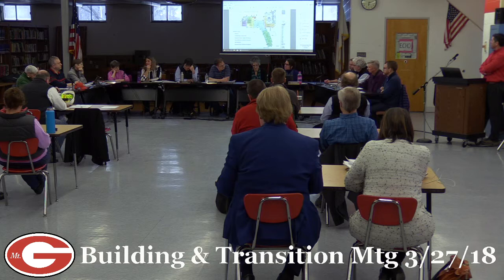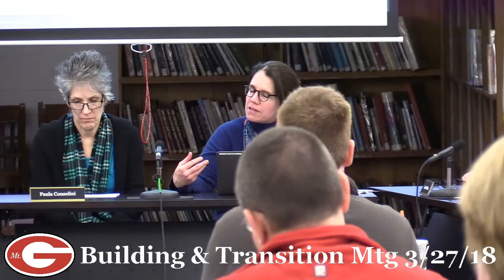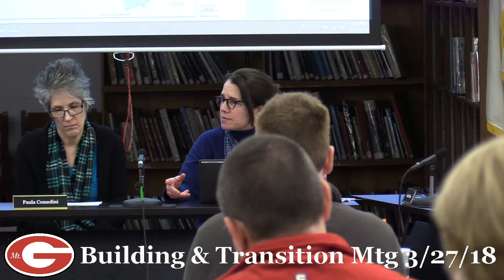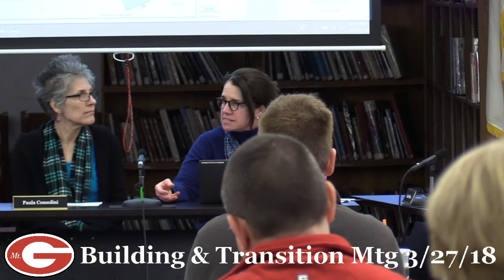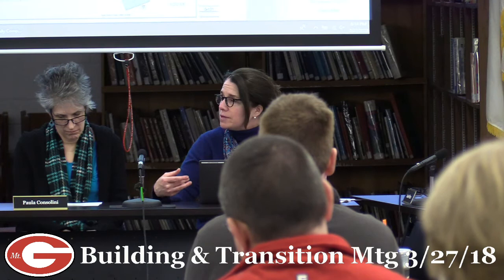And then we're making some decisions about how we'll move, with the idea of knowing when these sections will be available. Instead of doing the crate process where they pack up crates, roll them in, unpack, we'll do boxes that we can let sit through the summer. And we also know that some of the furniture and even the new furniture will have to go into the gym that we're going to use as a staging area. So our hope is that the school will be opened on the last week in August. And that's when equipment and furniture, et cetera, will have been moved into the appropriate classes and offices, but that at that point we'll be able to stage to have teachers come in and work on setting up their spaces.